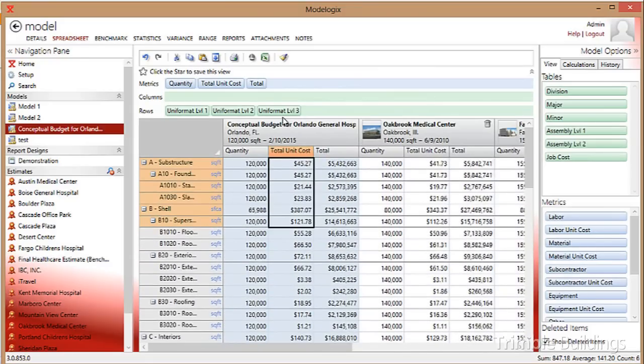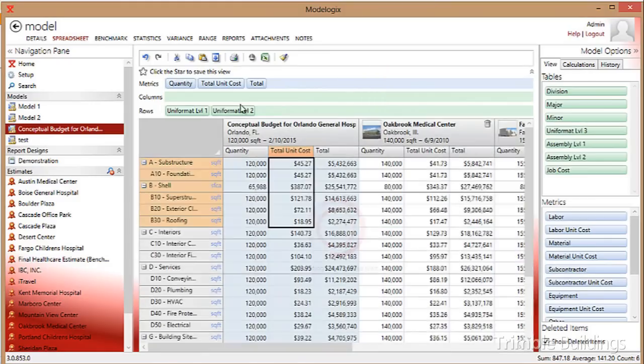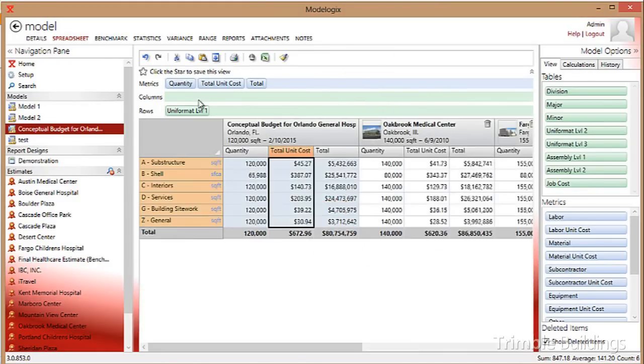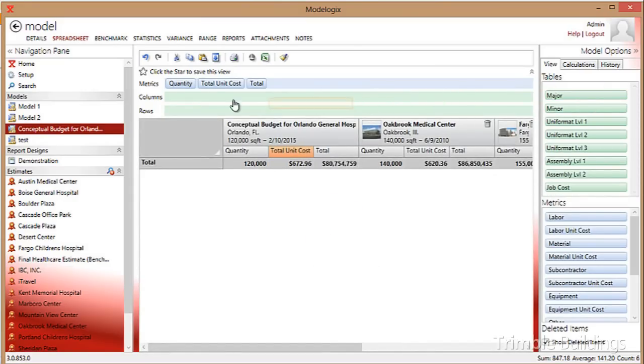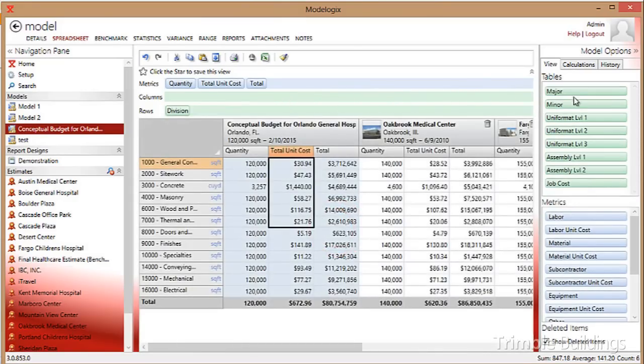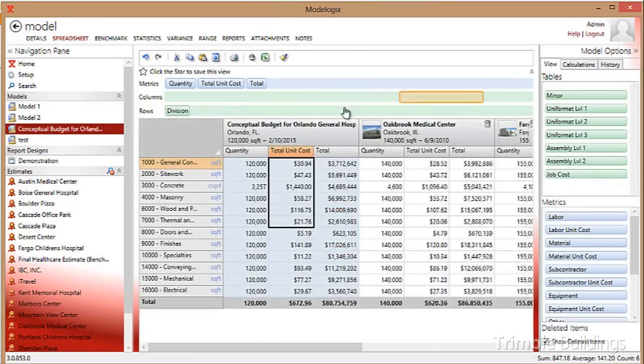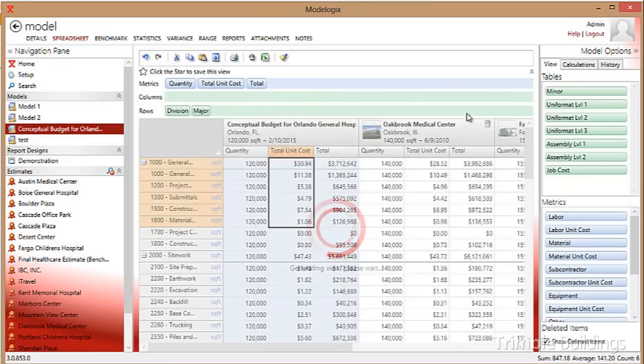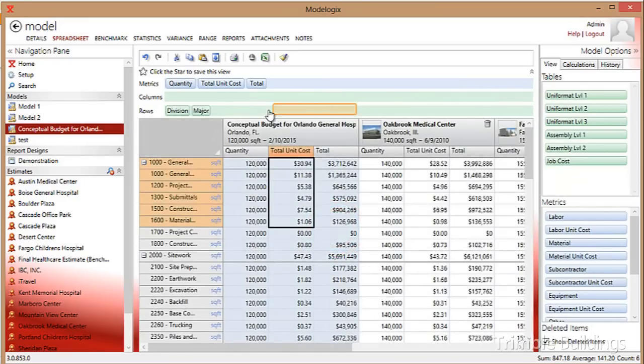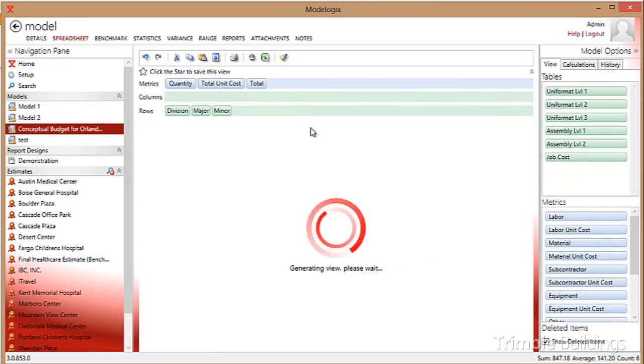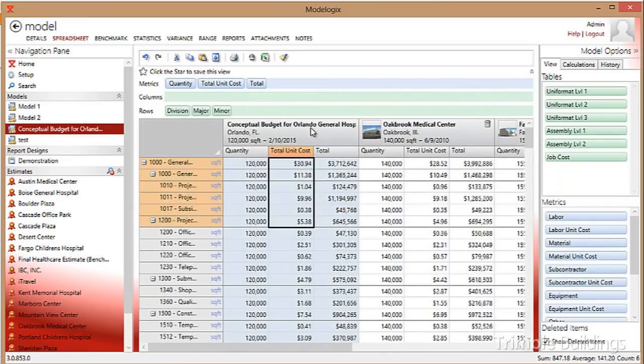Just as quickly, I could change my mind and determine that I want to create a cost model based on CSI. I drag the CSI division code, the CSI major code, the CSI minor code, and just that quickly, I'm analyzing this model, but I'm doing it using a completely different work breakdown structure.